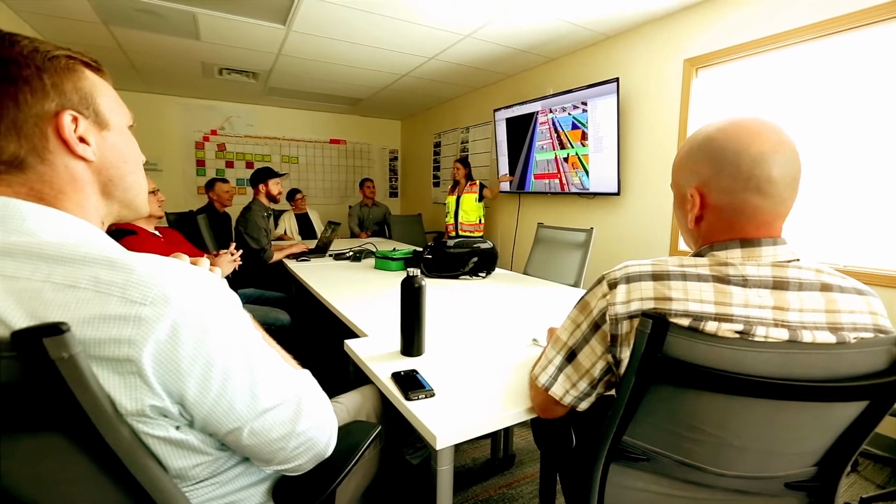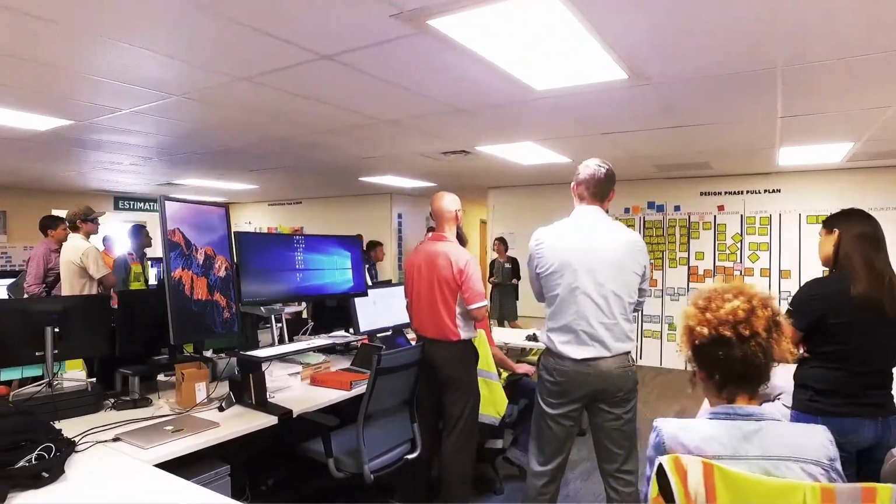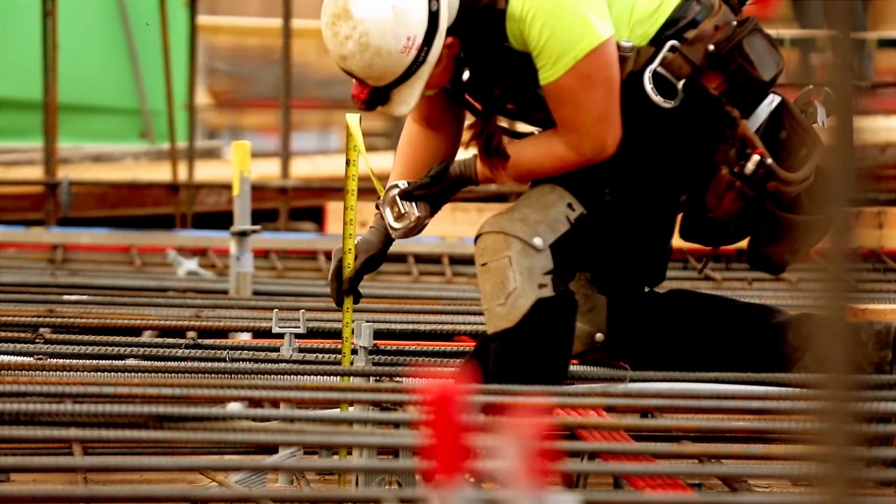The traditional way that we manage medical equipment in projects is just totally inefficient. What usually occurs is that we select medical equipment and it's placed in construction documents, but actually the real medical equipment selection is done during construction. I'll give you the example. The last project that I worked on was a large-scale hospital project.